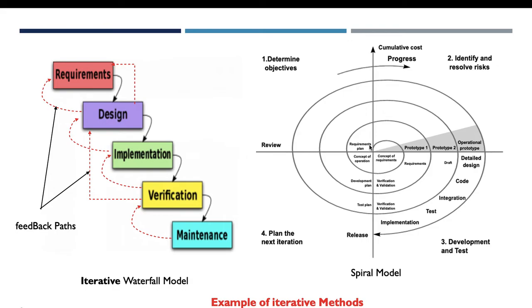Another example of iterative methods is the spiral model. In this model, each iteration goes through four phases: objectives determination, identification and resolving risks, development and testing, and planning the next iteration. At the end of each iteration we have a generated prototype, and this prototype evolves through iterations in order to generate the final release.